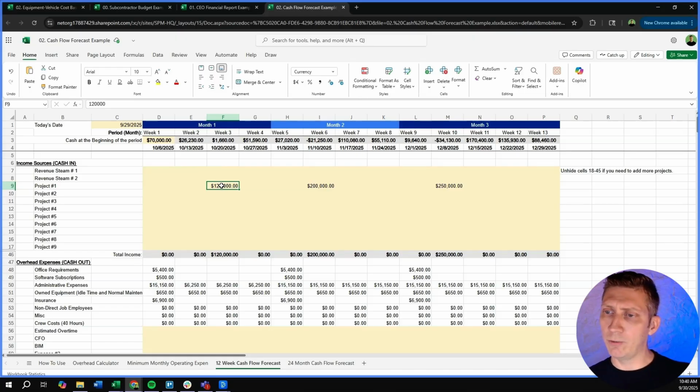So what we do is we know that a prime contract for a general contractor is 30 days from the end of the month. So your invoice is due on the 20th of the month. By the end of the month, they give it to the owner and it gets approved. And then 30 days later, they get paid, and then they have 10 days to pay you. So what that means, if I bill September 20th, October 1st, it's due to the owner. October 30th, 31st, that's when the owner pays the general contractor, and 10 days later, November 10th, is when I should be paid by. So, again, these are Mondays.